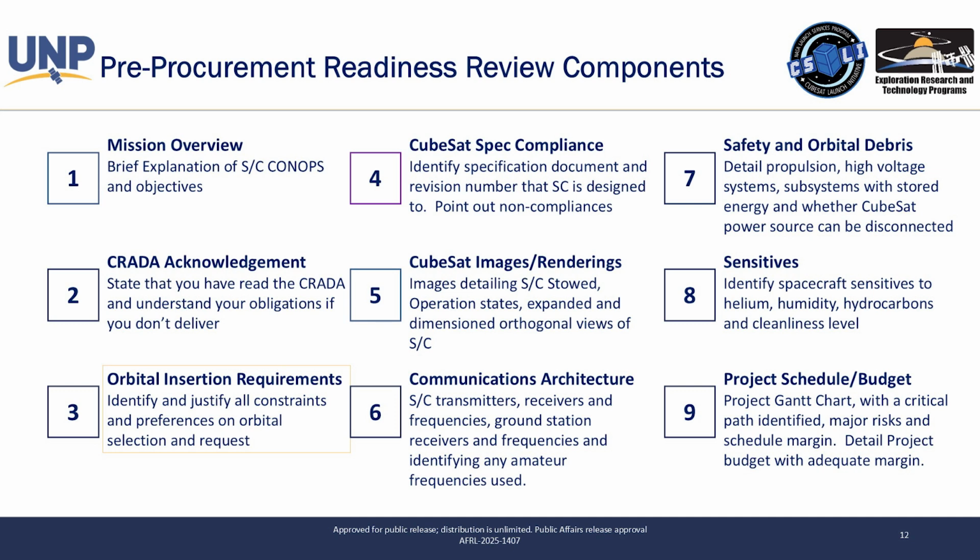We're going to look at the CubeSat spec compliance. Like I said before, the CubeSat design spec, CDS 14.1 on CubeSat.org, right? We want to make sure that you look at that spec, that you're able to identify what version you designed to, and then point out any non-compliances, because if we say you are compliant with that spec, we need to be able to point out the non-compliances to the launch vehicle provider so that they can provide a dispenser that meets all your requirements.